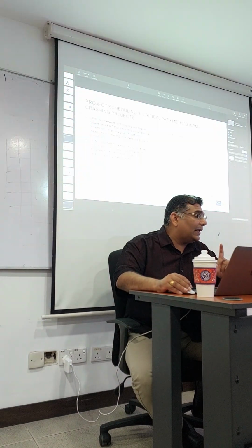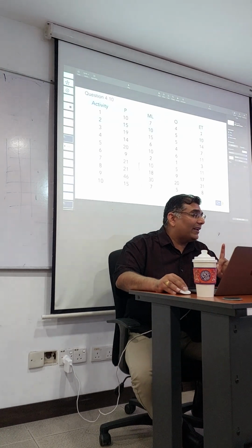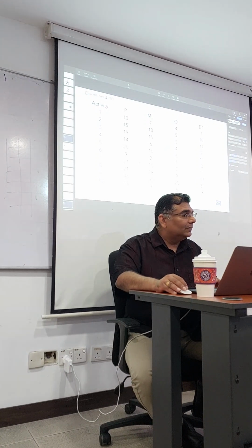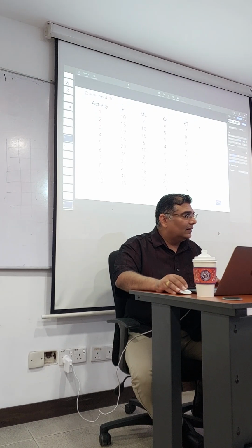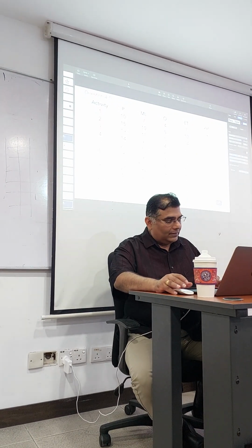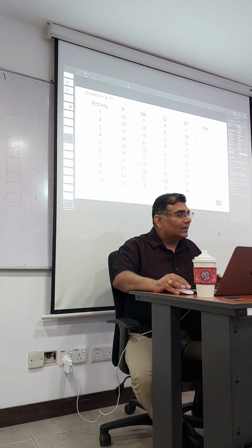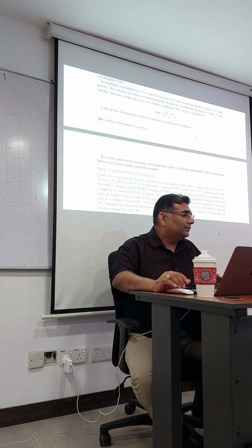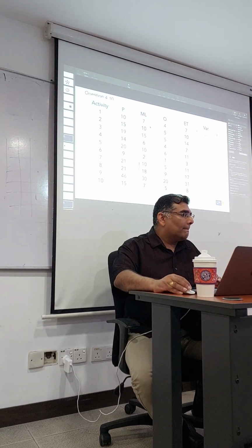Are we clear how to calculate this? Let me repeat. Are you all okay? By the way, if you have to calculate variance, how to calculate variance? Pessimistic minus optimistic divided by 6, and then square it. So what are you going to get? Calculation of variance, remember: P minus O divided by 6, and then P minus O to the power of 2, divided by 6 to the power of 2. So this one is P